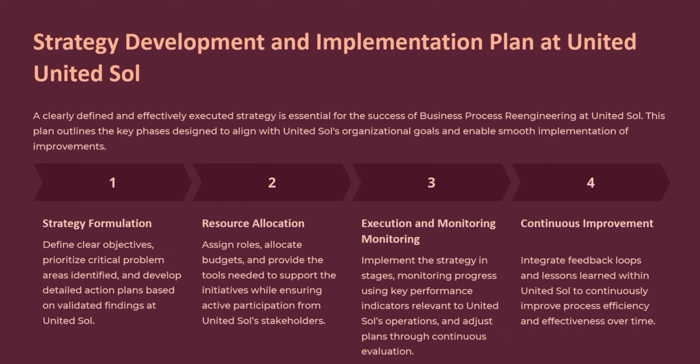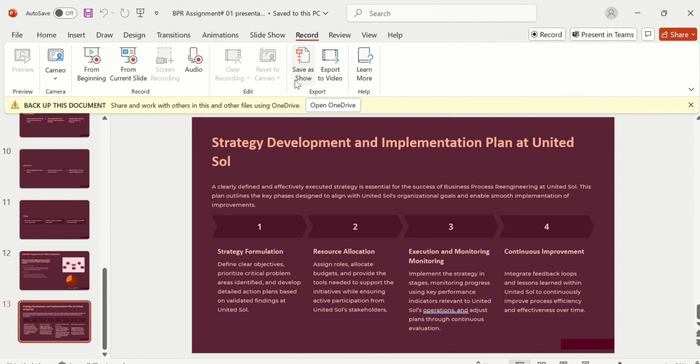For module division, we suggested using microservices architecture and breaking projects into well-defined independent components. To manage client change requests, we recommended implementing a change request system with proper approval workflow and impact analysis.